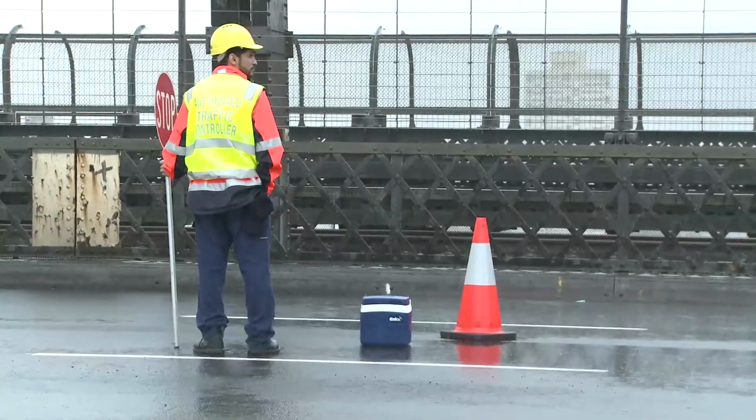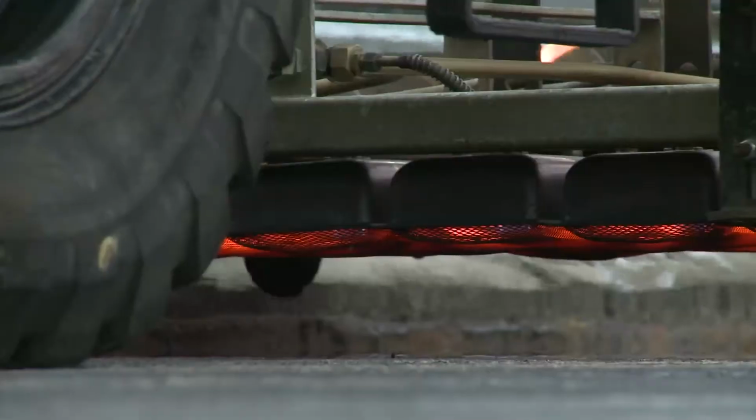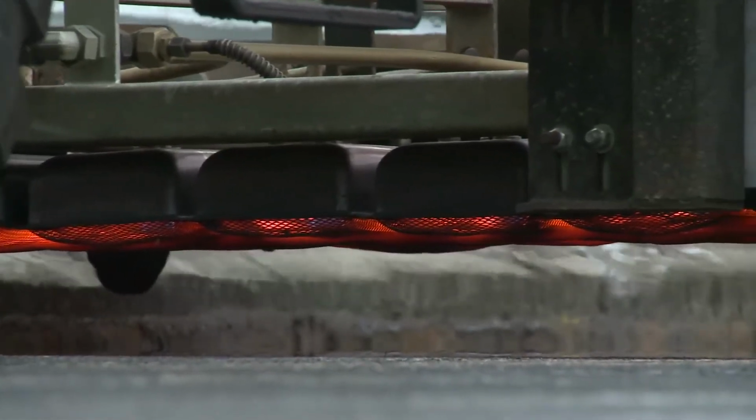The weather was actually quite unexpected, and whilst we'd spoken constantly to the Weather Bureau, the final outcome was quite different to what we were led to believe would happen. We actually vacated the site for about 8 hours, which meant that we had to go back and re-dry parts of it and then continue with the waterproofing early hours Sunday, which then had a knock-on effect for the asphalt works. We didn't do exactly what we wished to do last weekend.